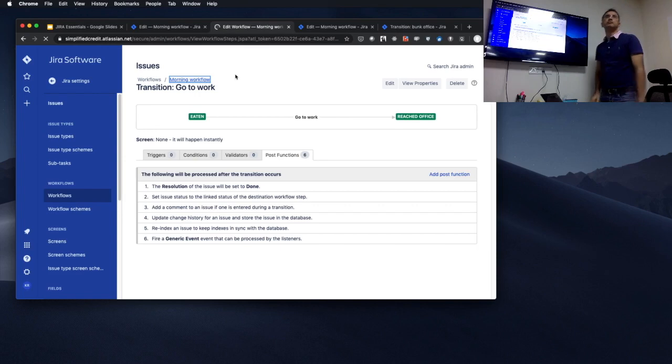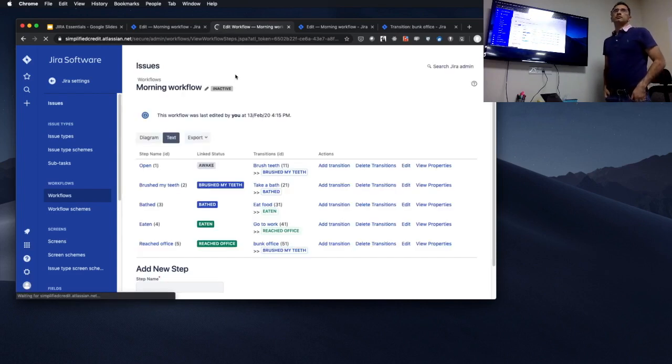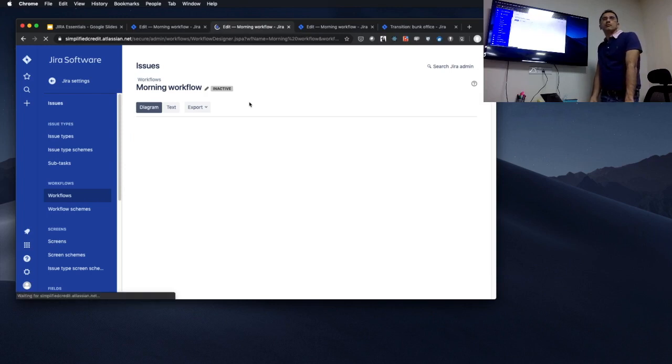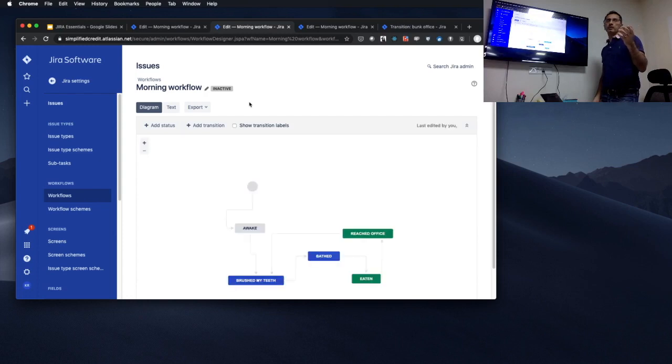What can be the resolution for a ticket which was in to do, followed the workflow and the different swim lanes and was accepted, but then a bug was observed again in release testing or later? We can of course push it from accepted to do, but what can the resolution be then? You decide what you want. But if you set a resolution, then it'll disappear. That's not the idea. That's a workflow transition. It disappears only when you close the sprint, not before that.